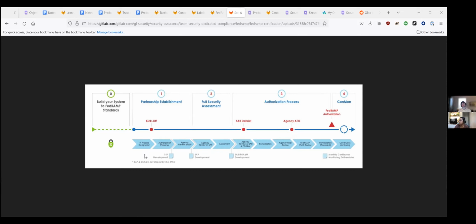So within this, if I were structuring it in my head, using just the functionality that I understand today, each one of these phases above might equate to a sub project, with each of these steps below equating to an epic, with each thing beneath that being a child epic, and both of those having sets of issues within them.